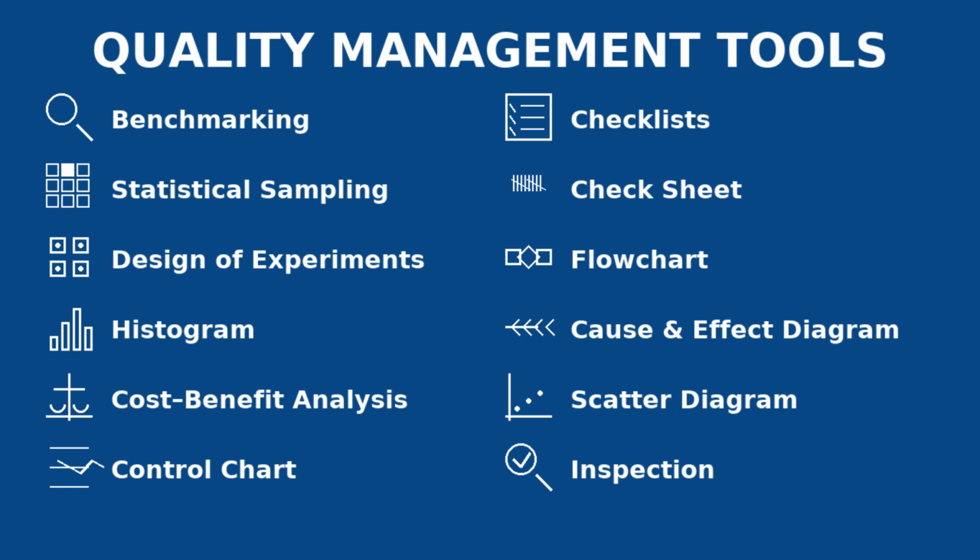We are moving to the next IT professional here. This project manager is finding out what is the acceptable range of performance. What is the tool that he is using? He is using a tool called control chart. Control chart is all about monitoring the process performance over time, to identify trends and to identify variations or deviations